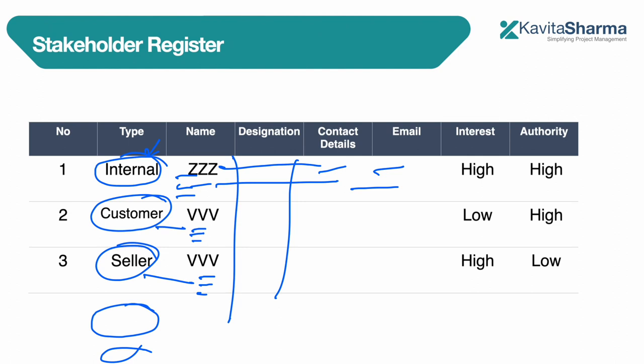For example, Apple's accessory sellers need to know product dimensions — their interest is very high. But sometimes your senior boss has to look at hundreds of projects, so interest could be low. Don't assume this — ask them, survey them: how much information do you want from my project? Do you want to come to daily meetings or have monthly emails? Note their preferences.